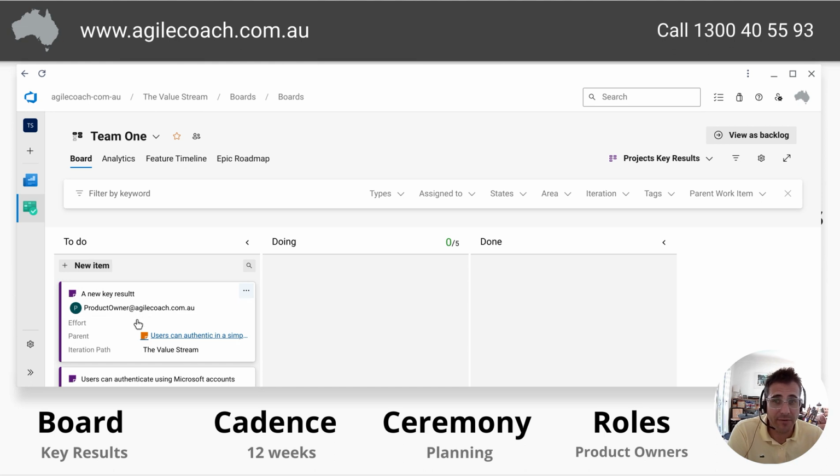So what you're doing there is just saying, well, how much effort will that be? I'm not going to go into how you estimate, but let's just say that will be 2 effort, and you might even commit it to a quarter. So in here, I'm going to go, that will be done in quarter 1. And that would be what you would do in that session. And that allows you to then go, well, actually, we know that we can fit 15, whatever you want to call them.